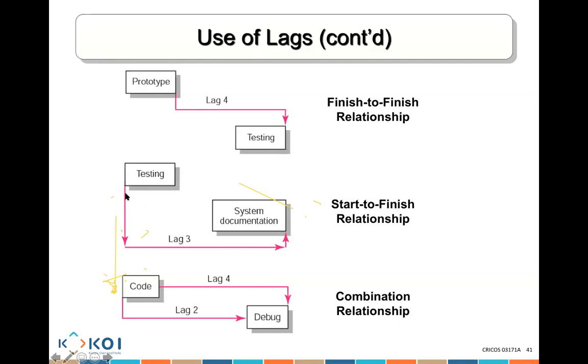So there are all of these relationships that you will create and you will usually put in your Microsoft Project when you're working on more than one activity. Just so that you will know that not every activity is a finish to start. In your calculation, I won't be giving you many lags, if any, but I want you to understand that sometimes there are relationships and sometimes there could be delays from one activity to another activity.